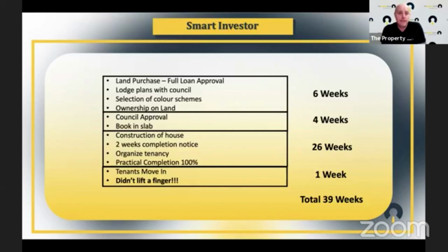And at the later stages, when the traditional way where you're doing the landscaping, etc., your loan on your investment property is basically fully drawn. So you're paying high interest, not high interest rate, high interest amounts each month while the concreters are organising and the landscapers, etc. This way, we get the keys and the tenant moves straight in. So I'm not wasting money. You think 2 or 3 months on a fully drawn investment loan at 550,000, it could be a couple of grand a month. So you could save 4 to 5 grand there comfortably as well.